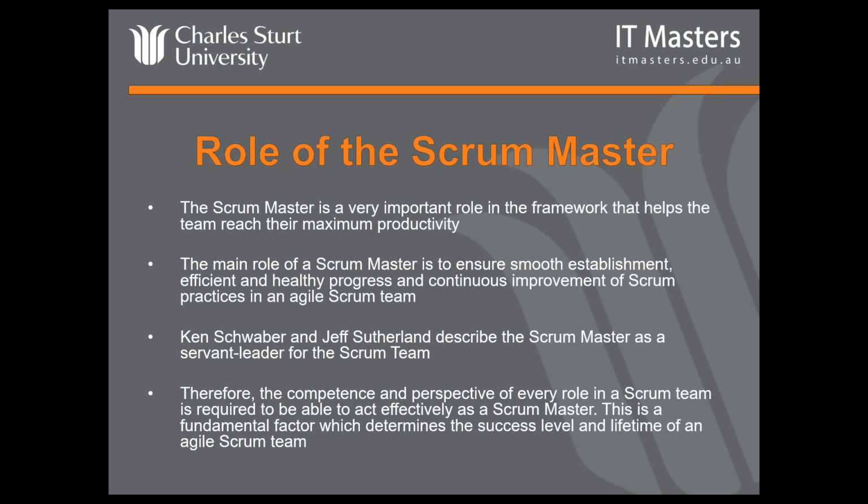I will just jump in here. Someone's asking how do you control scope if the customer's requirements evolve. I'm actually going to answer that in week 3 because we do what's known as adaptive planning. So it is about the customer understanding their scope can change, but if they increase the scope, they won't get it on the same date they expected it before. When you add stuff, it takes longer. That's the short answer to that one.